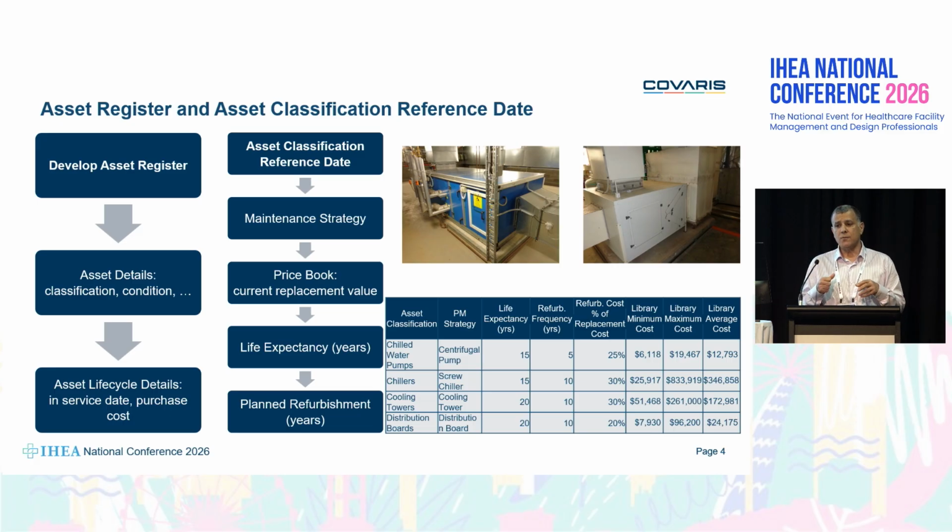And then you end up with, for example, in one building, just over 10,000 assets. So it is not going to be one by one. It's very difficult for life cycle cost modeling. So you have to use, for example, a classification, let's say the VBIS classification, and based on the classification, you'll say the cooling tower or a chiller's expected life is 10, 15, 20 years. So basically, we're going to replace this piece of asset in 10 years, 20 years. And some of the assets you may need to refurbish, like that cooling tower, where halfway through the life you refurbish it.